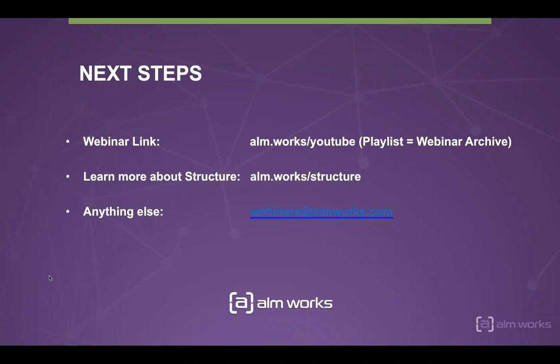That could be something to keep in mind, because I've seen this a few times that people would share a page that's where they do their reporting. They'll place a structure gadget or a tempo gadget, for example, in there. But because the user that's looking at it doesn't have the permissions in Jira, it doesn't render. The gadget will render, but the issues won't show up because you can't use any of the add-ons to violate the Jira permissions. And if they don't have those permissions there, they don't have them in Confluence either. So that's just something to keep in mind. But otherwise, they work almost the exact same way.